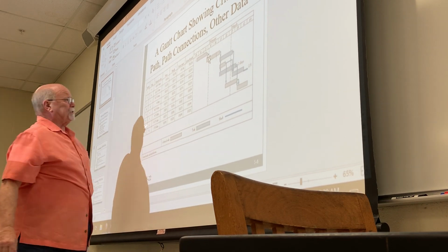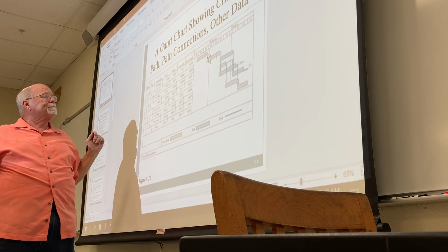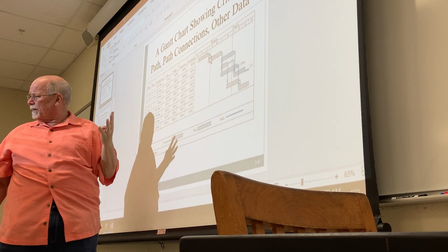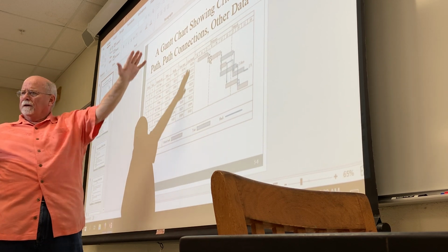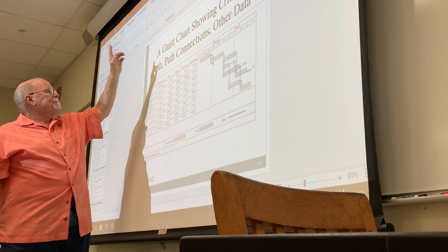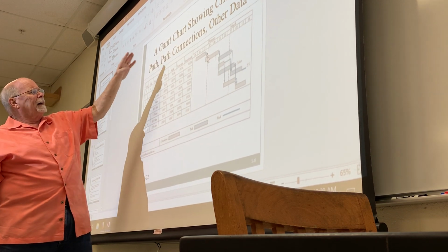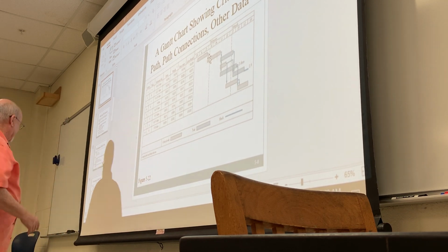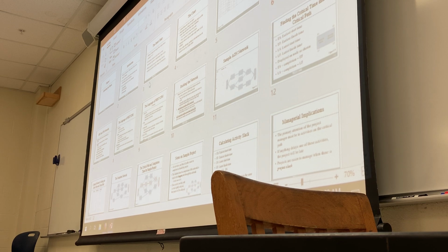We have done these repetitiously enough. We need the task number, we need the task description, we need the duration, and we need, last one, predecessors. That's what we need to get started. The WBS comes along, but we need first the sequence, this is the duration right here, the task, and then the predecessors. So 4 items, okay? We did the Gantt chart prior, so we had an edge on all of this.